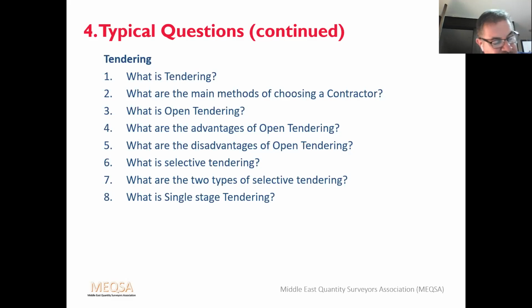It's a structured process of receiving competitive tenders from a number of pre-selected capable contractors who provide a lump sum for the works. Contractors are pre-selected on a basis like established skill, integrity, responsibility, proven competence and character, size of work. I would recommend that it should be no more than 6 on a list. I would say 5 is a good number. If pre-selection is done beforehand, then tenders can be selected on price alone. Good contractors have the following: recent experience, the necessary skills, good management and organisational structure, spare capacity and good financial standing. So that's what you're looking for in your first stage.